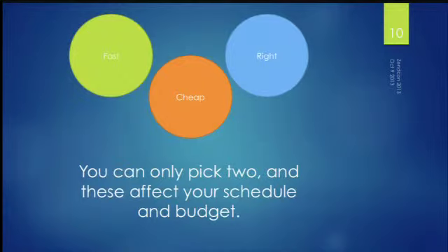And the other nice thing is if you have actual specs, and, for example, there's a contract that they signed up on and they want to keep adding stuff, you can always point out that, well, it's going to cost you more, so there goes cheap.